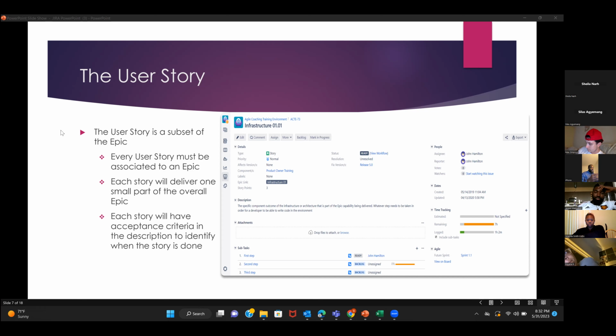So we're going to have a story and an epic, and the story is going to be associated with the epic. Does that make sense? So the epic is going to say build the Bank of America login page, right? And then the story is going to come underneath that epic. As a developer, I want the ability to create whatever, so that the user can log in, right? That's just an example, okay?